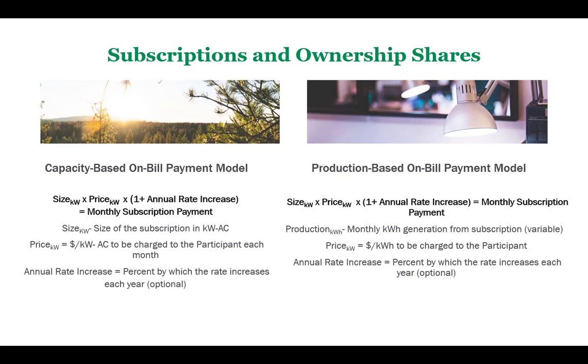Subscriptions and ownership shares. Project managers may structure their subscriptions to fit the needs of the project and its participants if the terms of the subscription meet the program requirements. By default, subscription fees will be collected by the utility as part of a customer's normal utility bill and then passed on to project managers. If a project manager wishes to collect subscription fees off bill, they can request to do so.